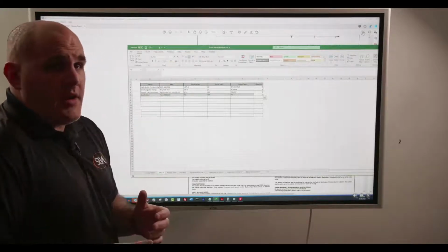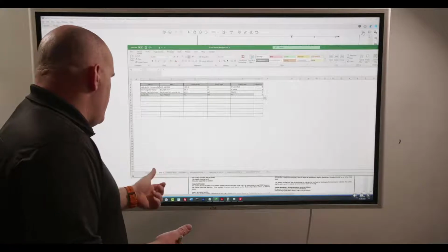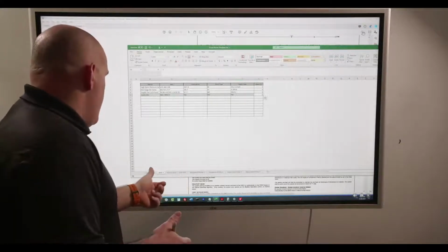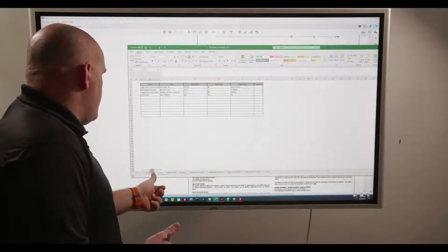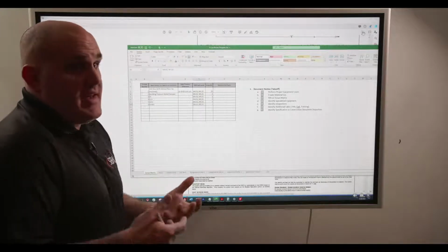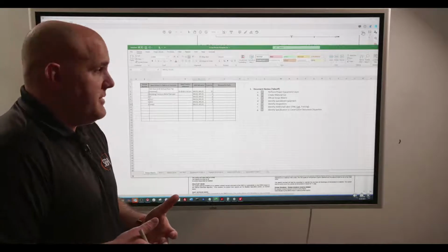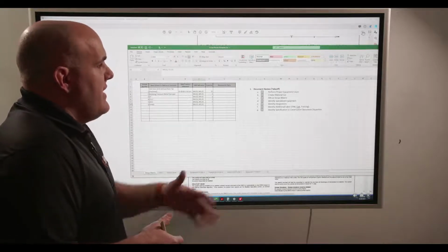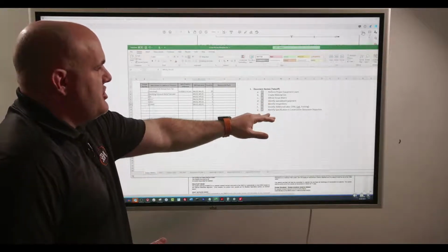Now from there, I've got a bill of materials built out, at least at a high level. I've got a scope matrix built out, at least at a high level. And now I can take this information to my electrical and get a good estimate. I can also really start to dive into D through G, which is going to be identify specialized equipment.